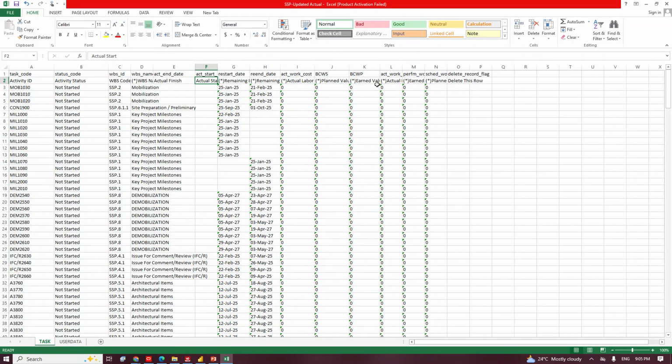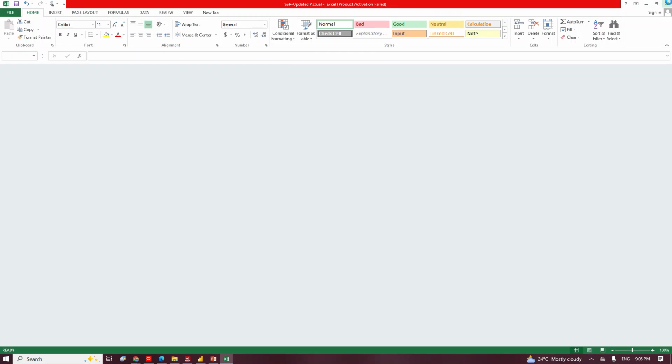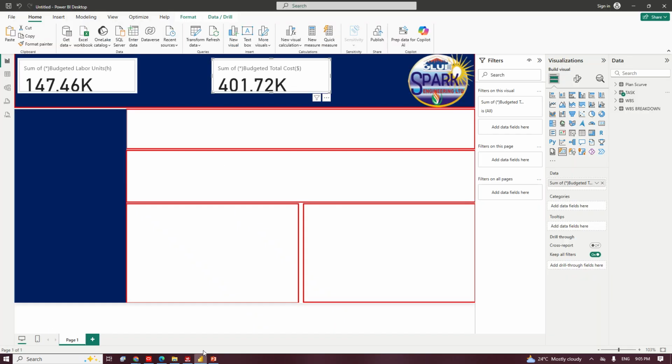So all these ones now are things that will be changing. I don't know if you copied it. The actual start, as soon as you update your project, the actual start here will update. As soon as you progress your project, the actual labor unit will update. So these are the ones we will be bringing in frequently. Okay. You understand? Yeah. Okay. So I'll just close this. Then I'll go and put it inside my program.